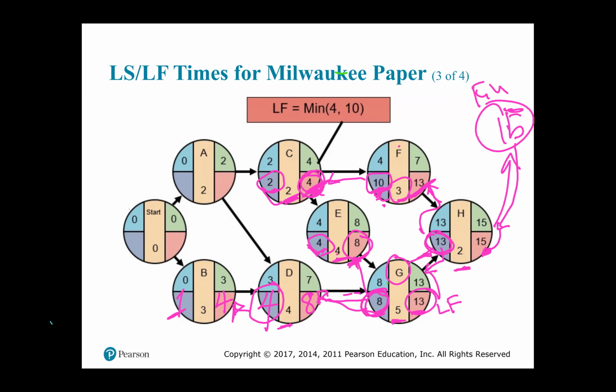Now, you're going to look from dog now to apple, D to A. But when you're looking from D to A, notice that you also have to consider an arrow from C to A. Why? Because an arrow left from A to C, even as it left from A to D. So on the backward pass, you must consider those arrows too.